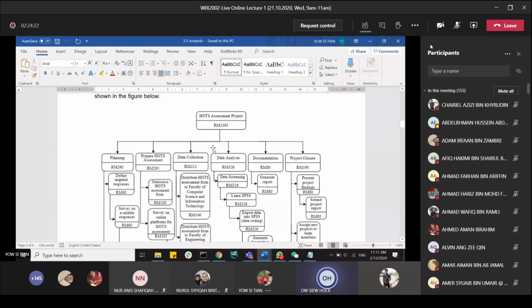By right, WP should be more accurate than the macro. The micro one should be very detailed, but because you're inexperienced, that's why you can come to your risk event. You underestimated using the micro approach because you are inexperienced in cost estimation. So you allocated the cost incorrectly. So in the end, your project will result in over cost. Because if you're using the micro approach, you're only at 1,000 something, but at the end of the project, it may end up, let's say, 12,000.